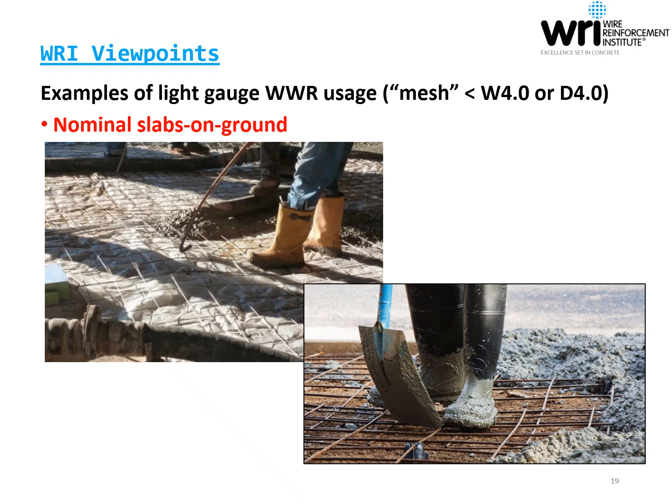If there is contractor hesitance or reluctance related to a particular design solution as presented by the specifier in the contract documents, it is important these concerns be voiced and reconciled sooner than later. For a typical design-bid-build delivery method, there are generally two main options for a contractor. They can either no-bid on specified work that they aren't confident that they can execute, or they can inquire about an alternative reinforcement pattern that might still achieve the original design intent, but by way of an easier support strategy.